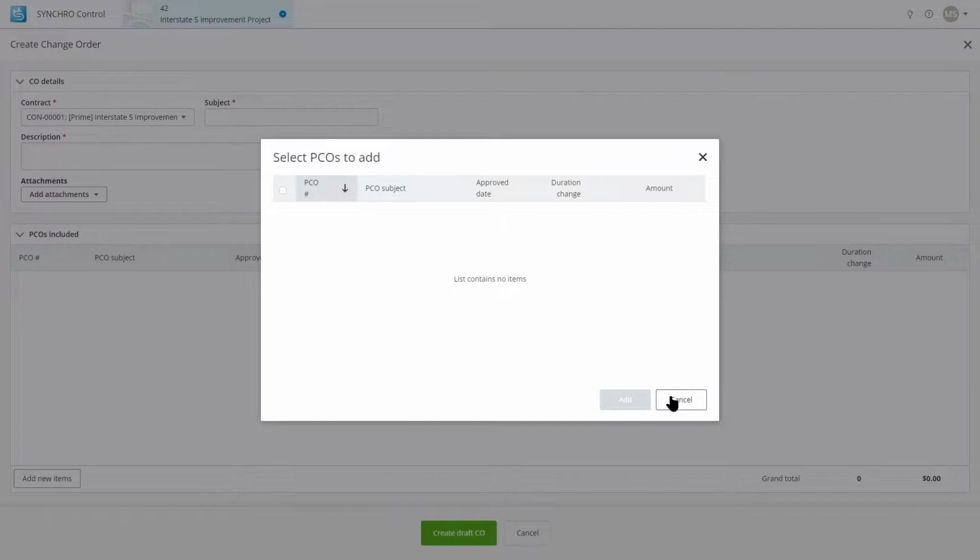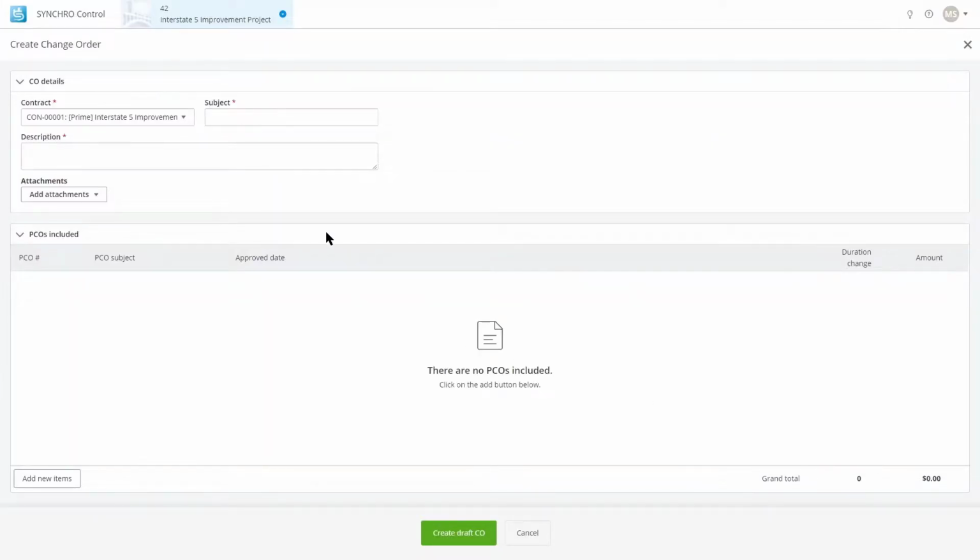If the change order was rejected, the previous one that we had created, then the potential change order item would appear here for me to be able to grab. It is acceptable that you create a change order with no potential change order line items within. It's weird, but we didn't want to stop anyone from being able to do that. Maybe they just wanted to do a $0 line item change order.